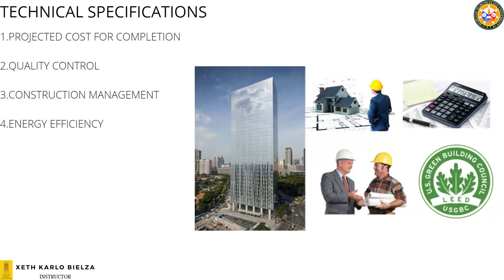A call-out alone does not specify how the material will be installed. For example, in a painting scope of work: will you paint when it is raining on your project? There will be conditions that allow painting, but if the surface to be painted is exterior, obviously during rain, you cannot paint. That condition is underlined and included in the technical specifications document. It serves as the basis for quality control or workmanship standards of the project.